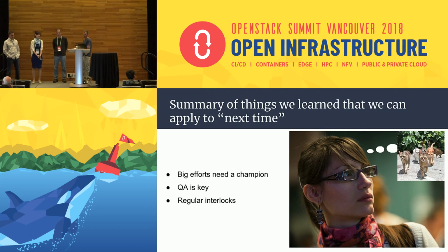So to summarize some of the things that we learned, this is sort of a blueprint, I guess, for doing development in the OpenStack community. As Ildiko said earlier, if you're doing anything across multiple services, you really need a person driving that. I didn't want to put project manager on this slide, but this is a project management issue. This isn't novel to the multi-attach feature. This has been done with other features between different services. But we also see this being done with the community-wide efforts that the TC does every release. And you basically need somebody driving all of those changes because it's across all of these different projects.